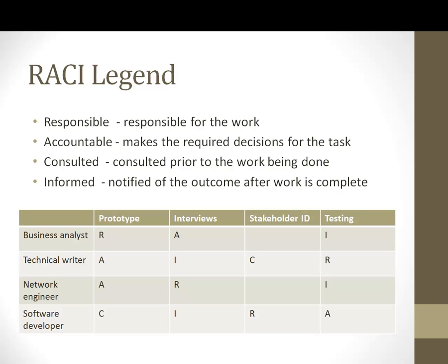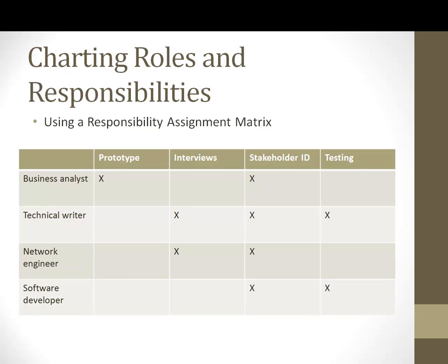Consulted means that you're kept informed, or you're consulted on that task before the work is done. And then informed is you're notified of the outcome after the work is complete. So you, the business analyst, could be accountable because you're making the required decisions. You could be consulted as people go about doing their tasks, and you could also be informed, like what was the outcome. So that's the RACI legend.